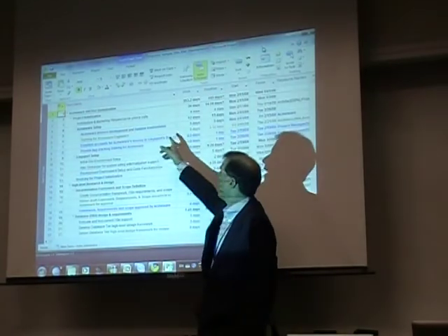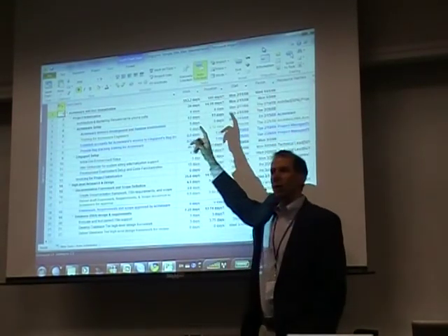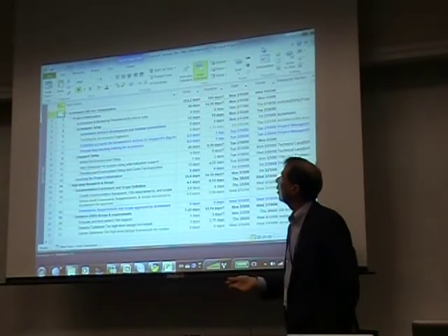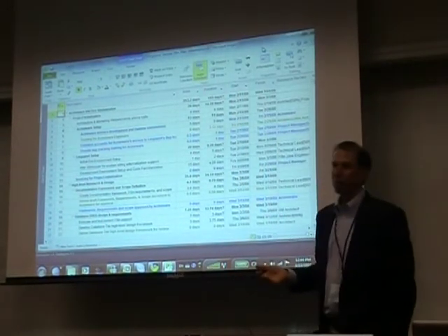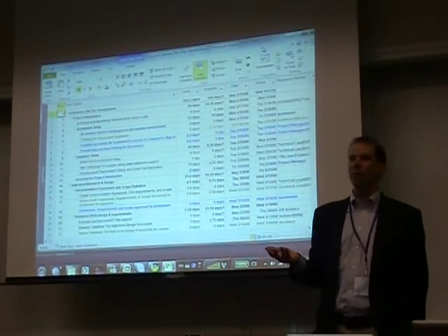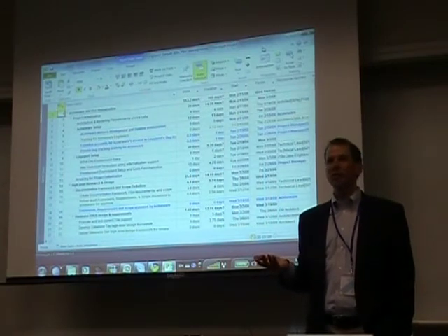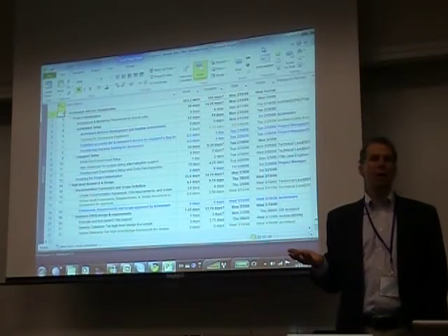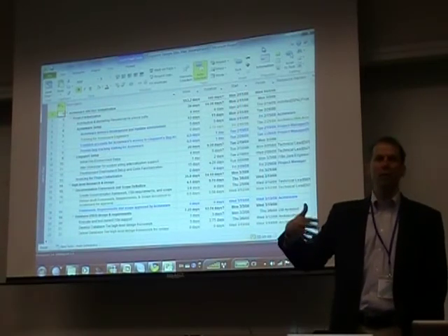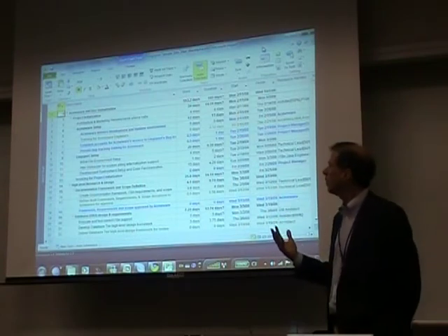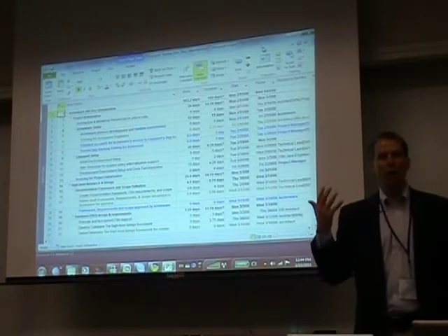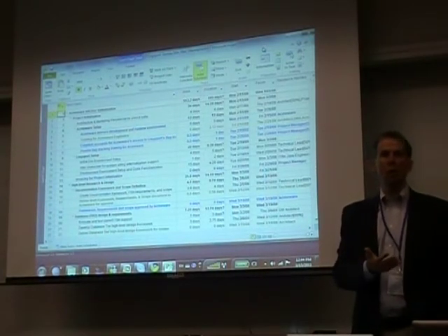Setup may not be as much of an issue for internal work. If you're working with an outside vendor, setup often gets ignored because people take it for granted. But when I say setup, it's not just setting up the individual development environment. Developers need a little chance to get familiar with the code, even if it's a short bit, just to understand the directory structure, to get a little training on that, and centrally coordinate that with the team. Also a little bit of training on the documents that were produced and the project plan approach.